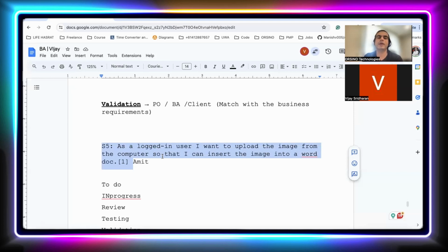Yeah. But sometimes what happens, it depends on the type of the agreement, or let's say the request for proposal and the quotation for the budget. Maybe any minor changes are included up to, let's say, 2 months, or any bug fixes are included after the project is launched; for the initial 6 months, we will be supporting all the bugs or any production issues. So it depends a lot on the way you negotiated the contract with the client. And maybe they'll say, up to 6 months, we will do it free.